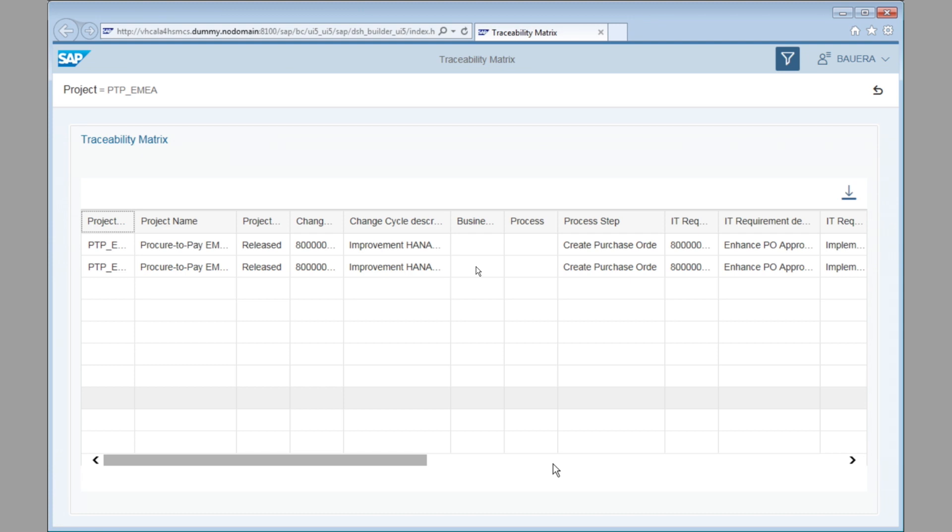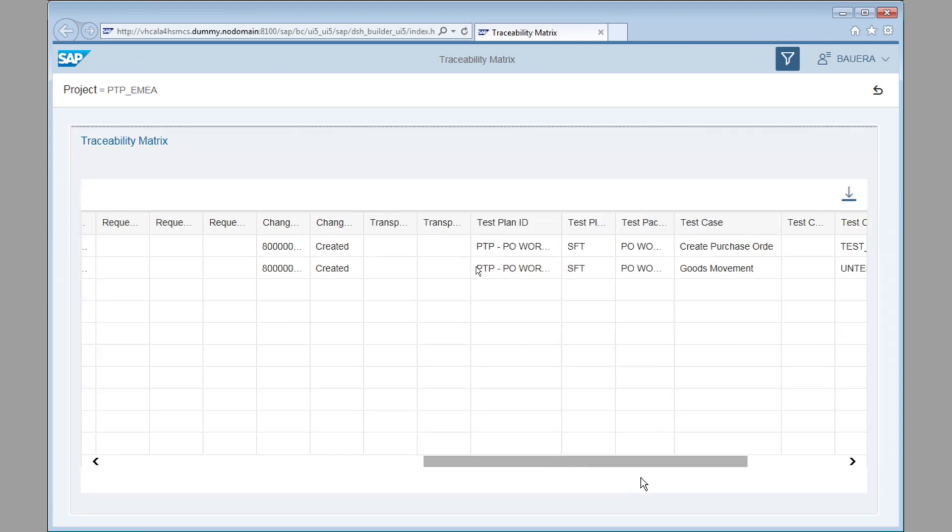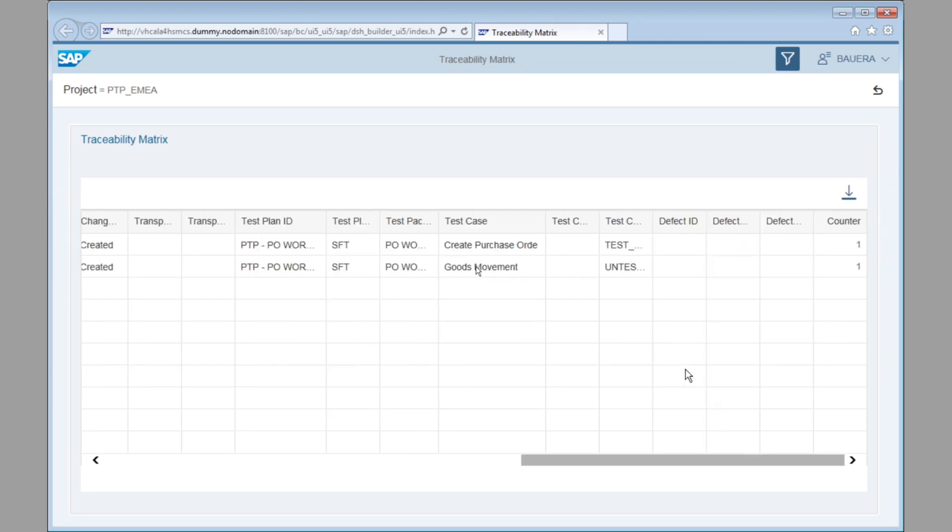It contains the information, what project it is that we have worked in. It will name the changes, the change cycles, the process steps that have been changed. It also has information about the test plan that is used for sign off, including the test case, information about the status of the test case, and also, if available, any transport that is related to this whole end-to-end process.